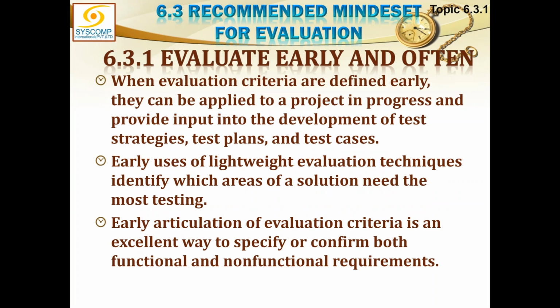Evaluate early and often. When evaluation criteria are defined early, they can be applied to the project in progress and they provide input into the development of test strategies, test plans, and test cases. Early uses of lightweight evaluation techniques identify which areas of a solution need the more testing. Early articulation of evaluation criteria is an excellent way to specify or confirm both functional and non-functional requirements.